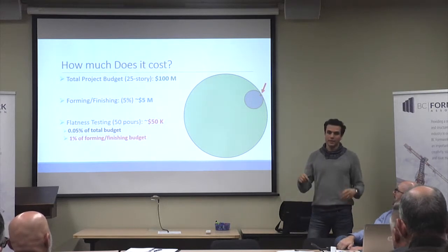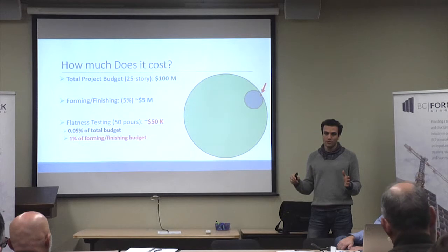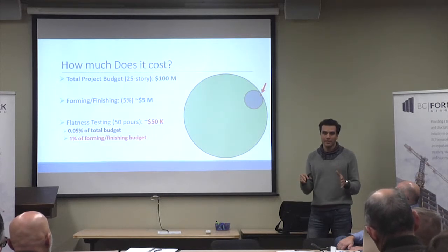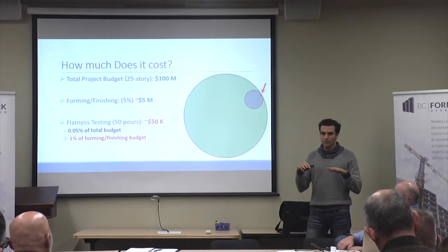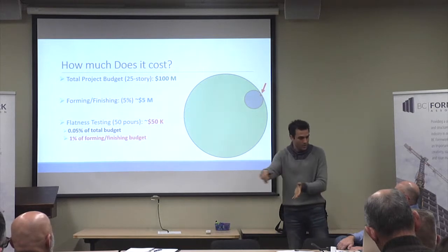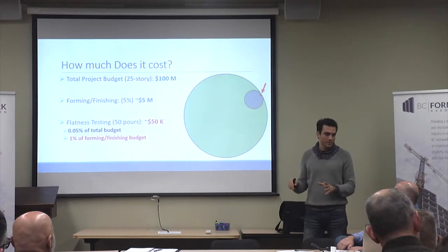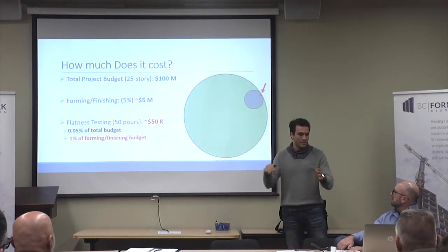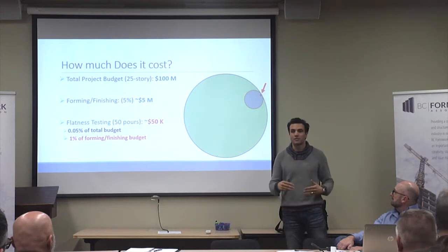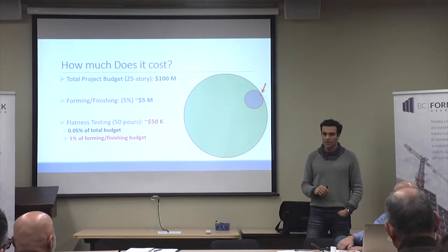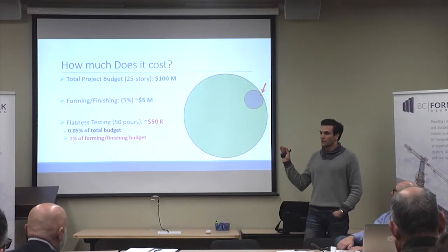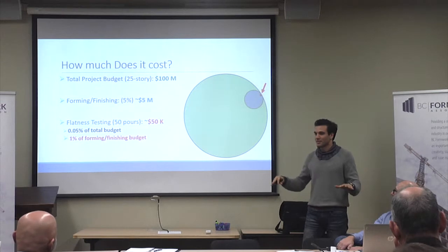Well, the reason is, I think, basically we are there to test how well the finishing company has placed and finished. So it is hard to get all of those draws to the edge of the slabs and to the columns. That's why ASTM E1155 has asked the tester, the inspector, to stay away from it. That's actually a favor to the forming and finishing company, so that if it's a pass, the good part of the slab is tested and it's passed.